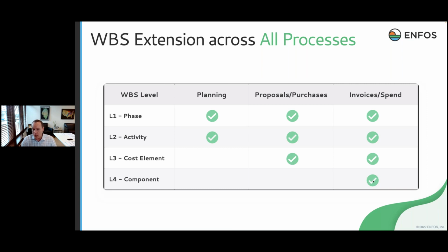The suppliers know, right, out of the spend for this monthly invoice or for this milestone released invoice, I know my labor and equipment and materials, and I know that cost accounting granularity, so I have that data structure. But everything now rolls up, right? If it's labor and it's on permitting and it's part of our construction remediation plan that is in our remedial action phase, these all line up vertically, right?